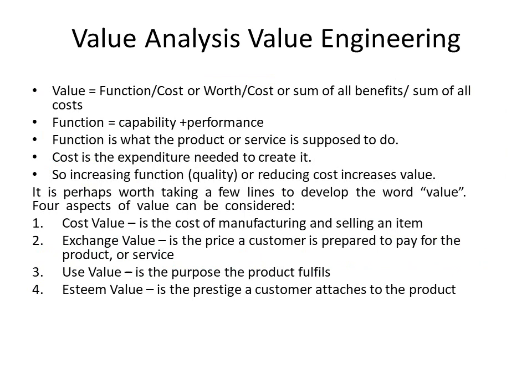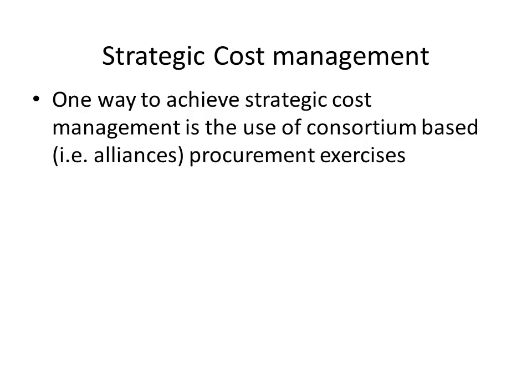So a little more theory on value analysis, value engineering. Definition of value: it's function divided by cost, or worth divided by cost, and the function is the capability plus performance. So we can increase value by reducing cost, but we can also increase value by improving the function, more usability, improving the quality of the project. And cost can also be defined in terms of cost, exchange, use and esteem value. So a useful slide there on value engineering.